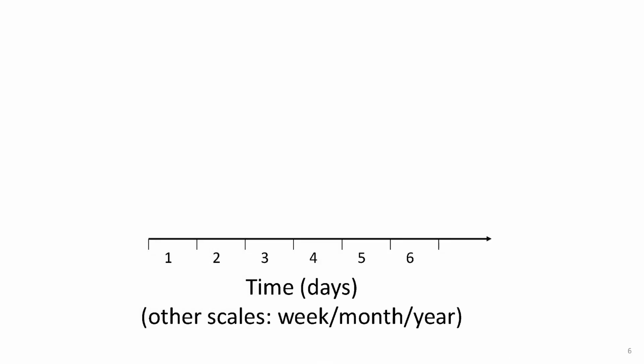All right. Let's take a look at an example of a time-scaled axis. The time unit can be a day, a week, a month, or even a year. Since construction projects are usually large and can take months or even years to complete, we don't typically use smaller units like hours or minutes. If you want a more detailed schedule, you could break it down by days. But if you're focusing on the big picture, like major construction phases or summary activities, you can use larger time units like weeks, months, or even years.